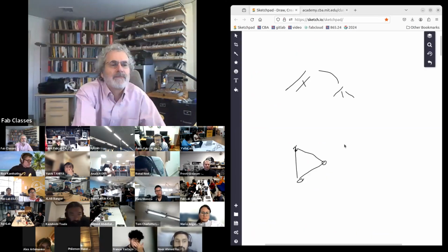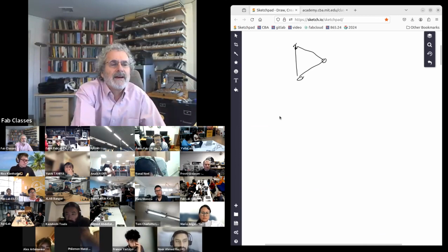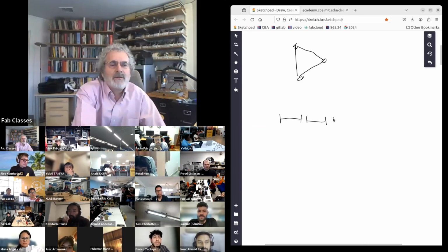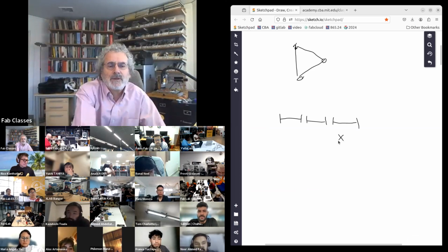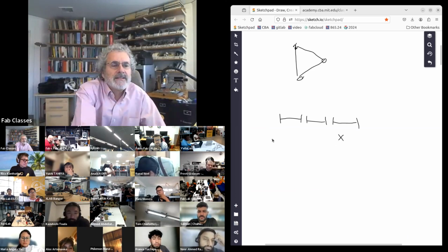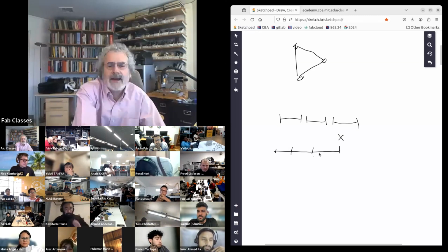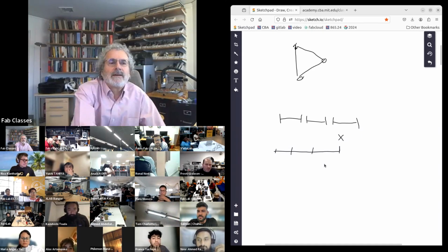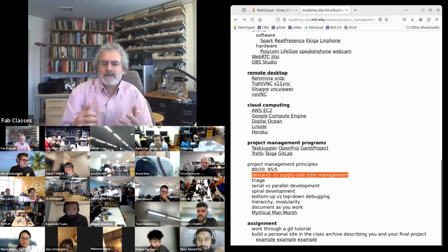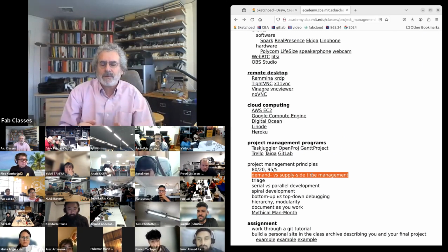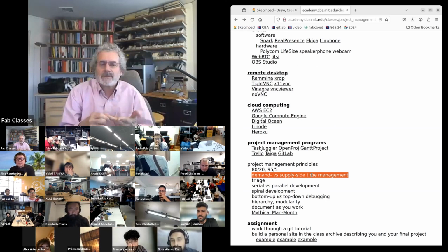Demand versus supply side time. Demand side time is you do a task, then you do a task, then you do a task, which sounds obvious, but if you needed to finish here, you ran out of time. Supply side time is you start in advance, take the time you have, and divide it up by what has to happen. Demand side time is you read a Git tutorial, you read an HTML tutorial, you start building a website, but this all needs to be done by next week.